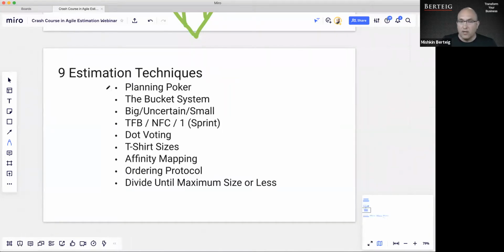Okay, so number 1, planning poker. This is by far the most well-known agile estimation technique. Basically, you get a group of people together, everyone gets some votes, and the votes are basically physical note cards that allow people to say, hey, I think this estimate is 5 hours or $50 or 10 points or whatever unit you're using. And the voting process allows the team to come to a unanimous agreement on an estimate for everything that you're estimating. There's lots of good reference information about this. Wikipedia has good descriptions of this, so I'm not going to get into any more detail.